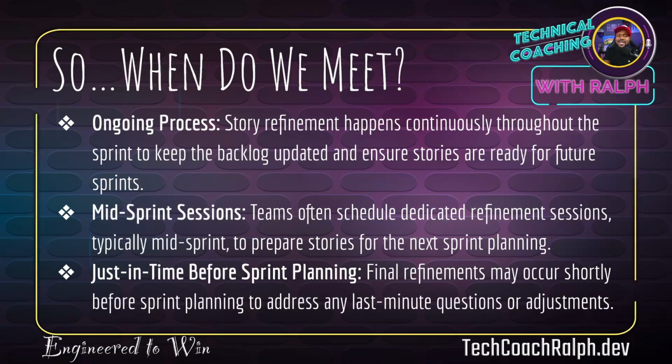So when do we actually do these meetings? It's actually an ongoing process. I've been in story refinements where we have a meeting once a week, sometimes twice a week, usually about an hour to an hour and a half. It happens continuously throughout the sprint to keep the backlog updated and ensure stories are ready for future sprints.